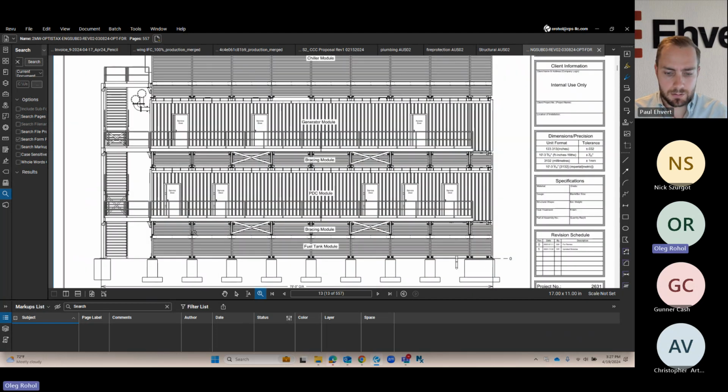So how it's supposed to be done, the first layer, we could say, is the fuel tank module and the bracing module. That should be assembled in one day. Next comes a PDC module and bracing module. Okay.